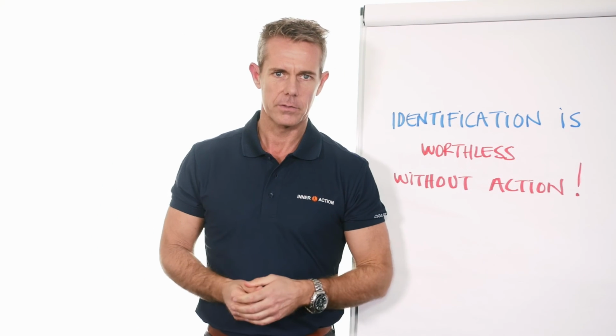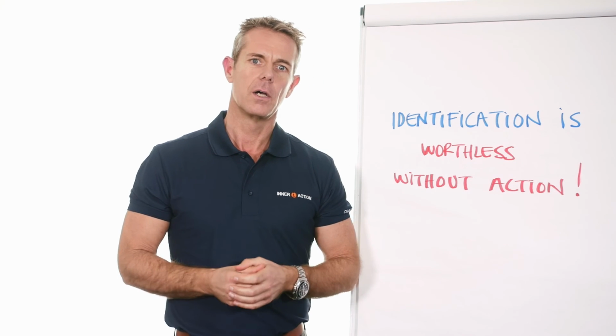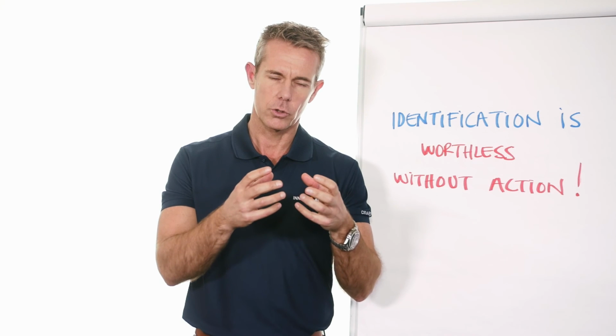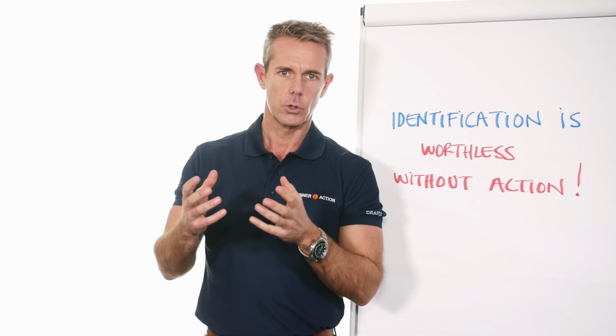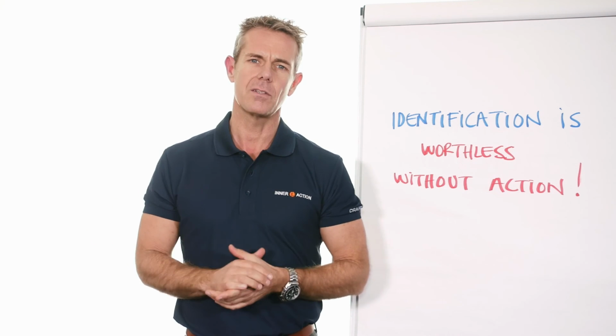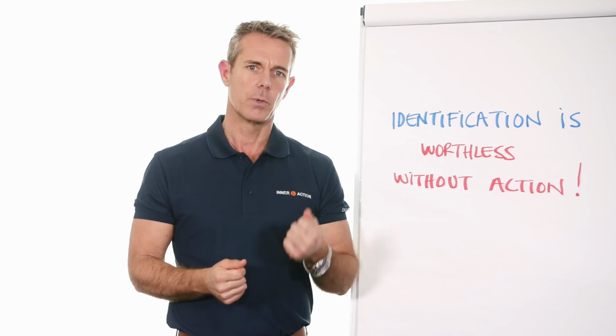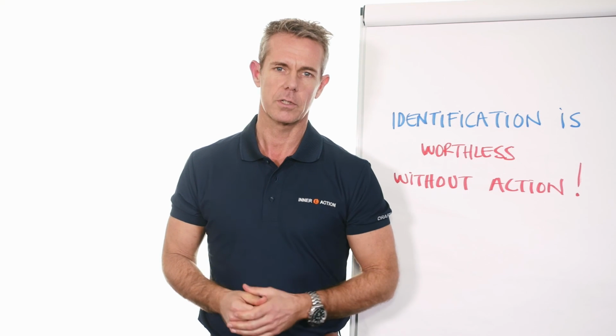And here we have different templates. We have what we call a stakeholder assessment sheet and a communication plan. This is where we have developed some tools that will help you document your stakeholder assessment and also plan for the actions you're going to take. You're scoring your stakeholders, you are assigning responsible people to take care of them and communicate to them, and you also develop a communication plan that will allow you to communicate in a proper way to these stakeholders. If you're able to do this successfully, you will be more successful in your projects, because stakeholder management is one of the most critical areas within project management.